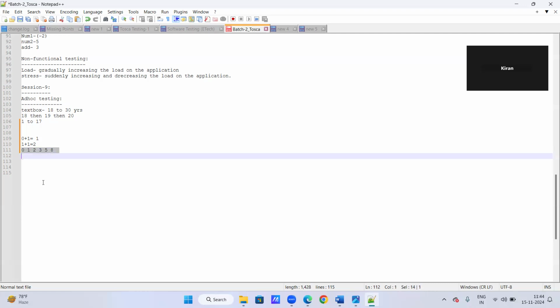Yes, yes. So here, suppose when I say 1, some companies consider one story point to be equal to 1 hour, and sometimes they consider one story point equal to 1 day. One story point equals 1 hour or one story point equals 1 day. 1 day means 6 to 8 hours. So depending on the company, they will consider 1 hour or 1 day for one story point.